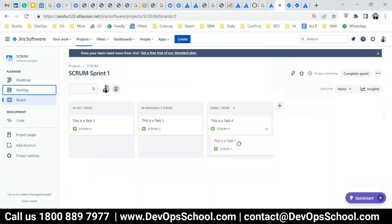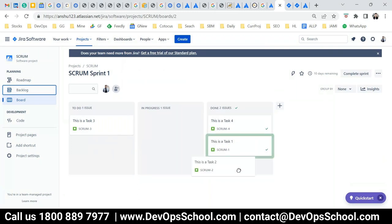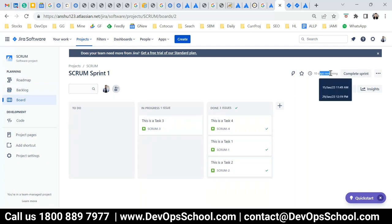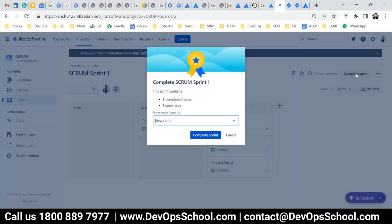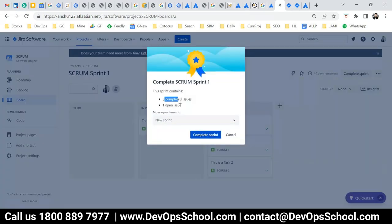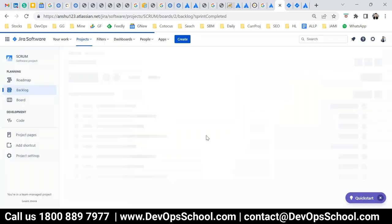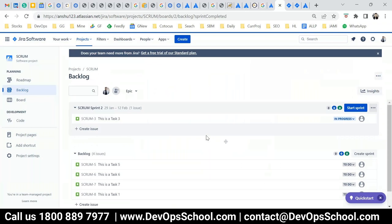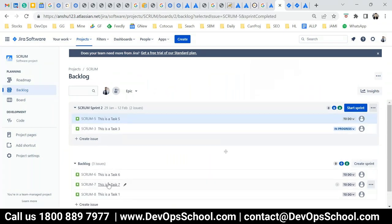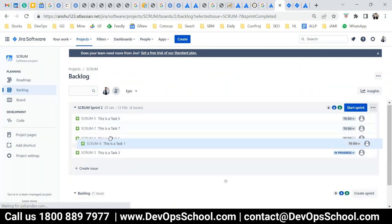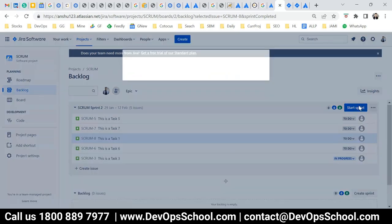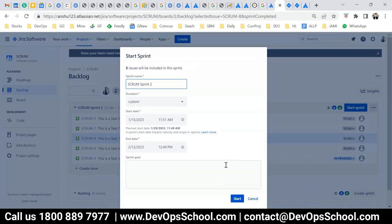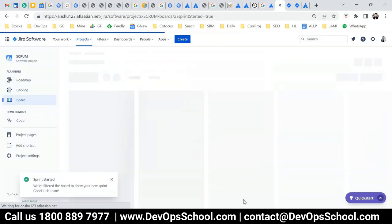After 10 days automatically it will get over by the way. I'm forcing, complete the sprint. So you see the three issues got completed, one issue got to go into the backlog. Complete this and start this, the one issue starting the new sprint after two weeks. And here it is. Now I'm a scrum master so I'll push for the next two weeks like this. And start the sprint again. This is sprint two after two weeks and I'll keep doing the thing.